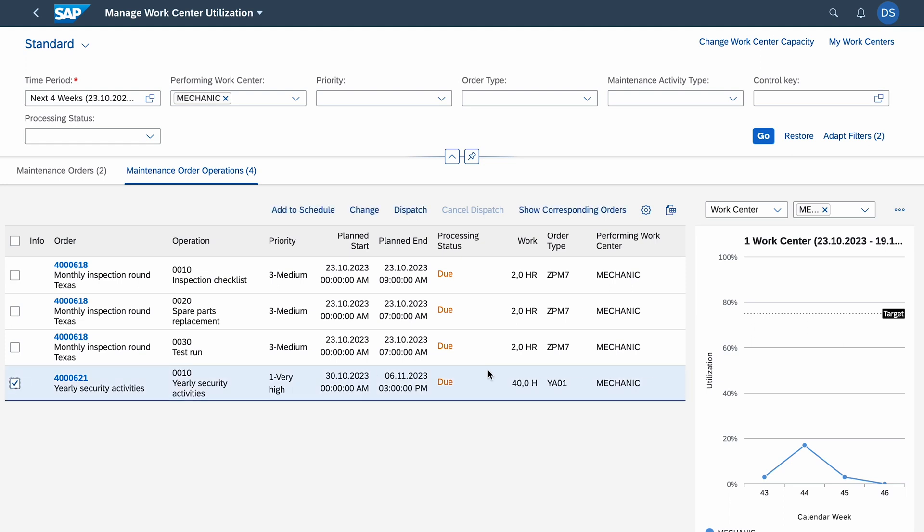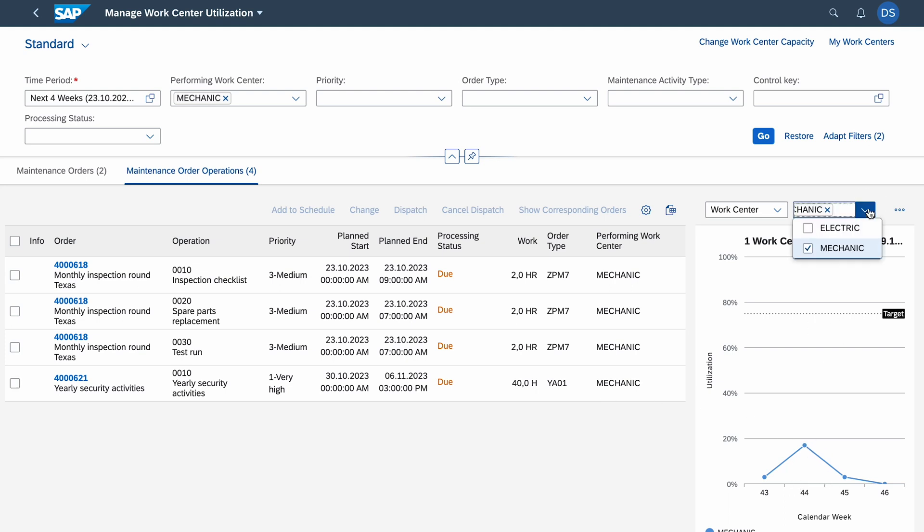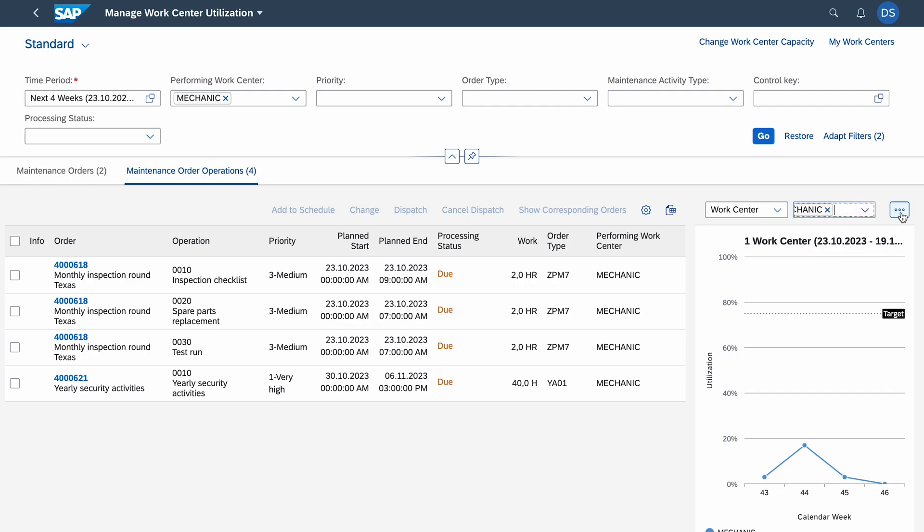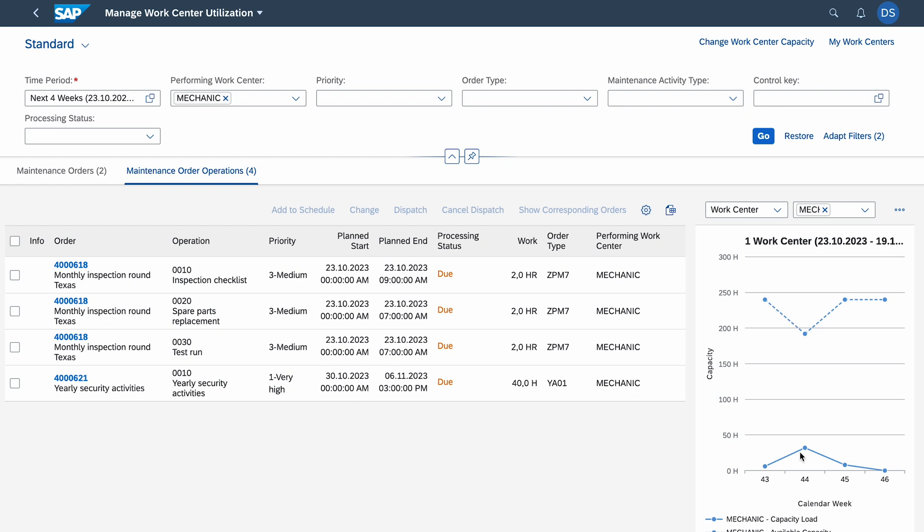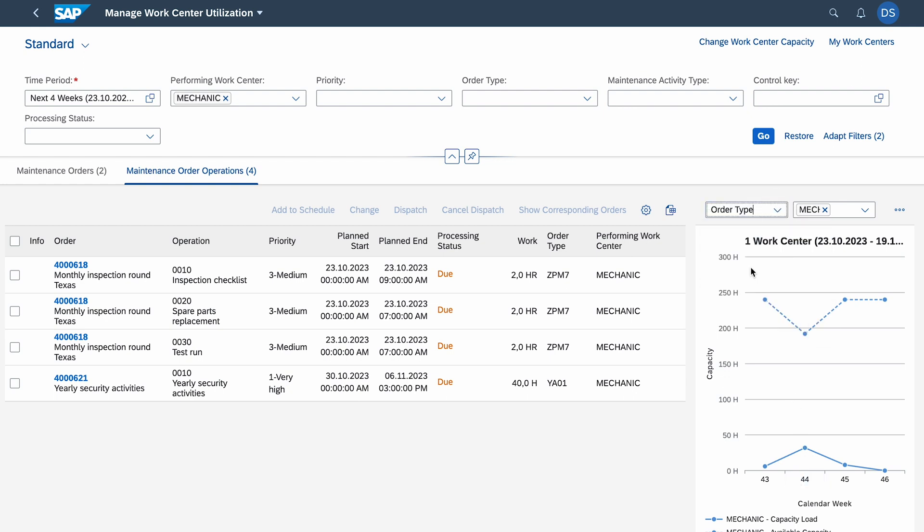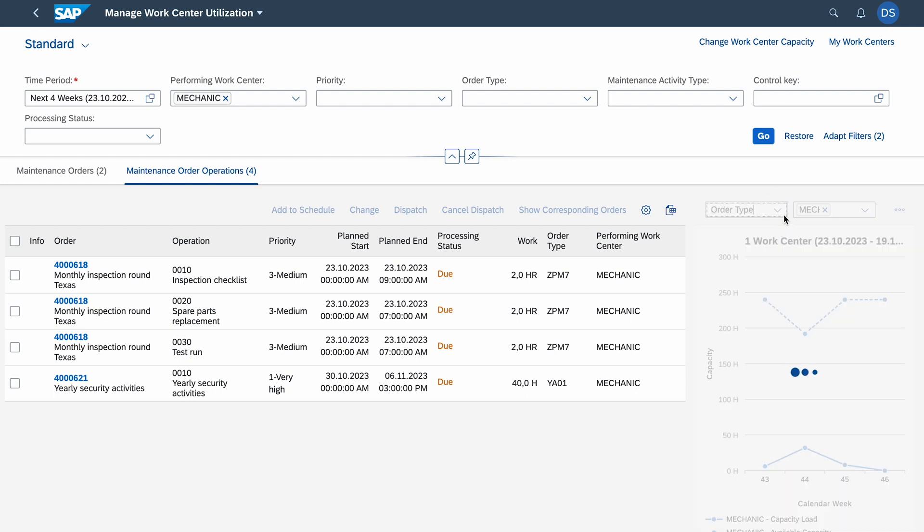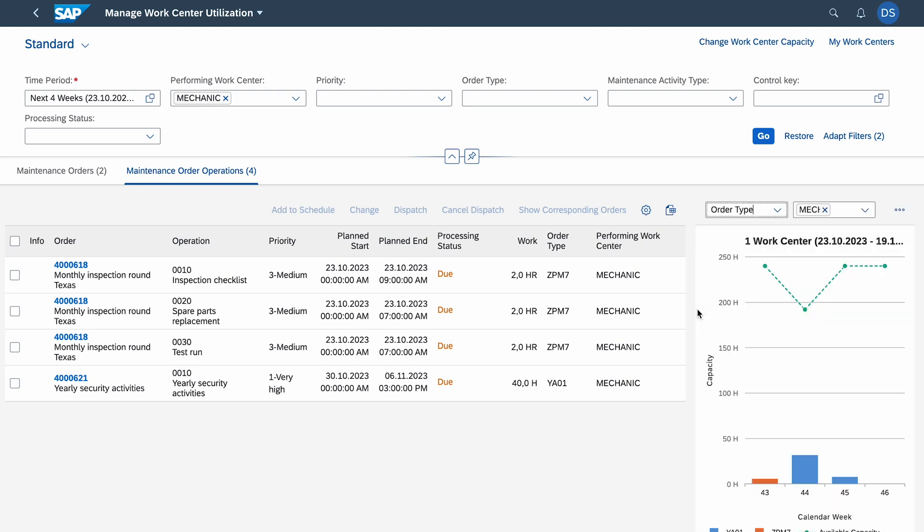We see that the first three operations are planned for this week. Again, we have 25th of October when I'm recording this. And next week we got this big order for 40 hours. That's why you saw 17 percent utilization of this work center. Here we got some graph. You can see the utilization. Of course you can change it, we have some settings here and we can change the views and order type.